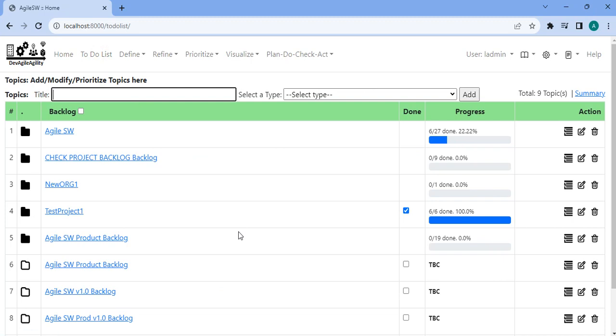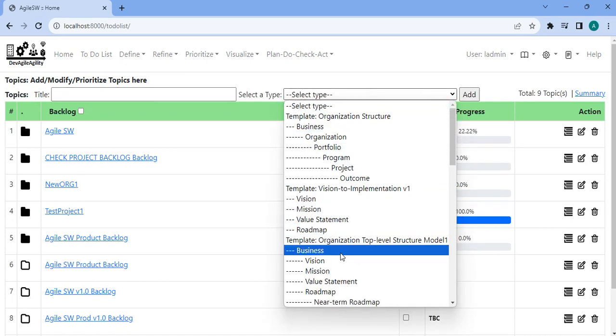So you can have a scaling application or scaling implementation in your organization. Accordingly, your work breakdown structure will change. For example, if someone is implementing strategic teams or team releases or team epics, then you have features or components or RFPs or POCs. Under this you will have user stories or components or spikes and things like that. You can define any level, so it's customizable, and you can choose a template and then apply that template. So these are different templates you can create.